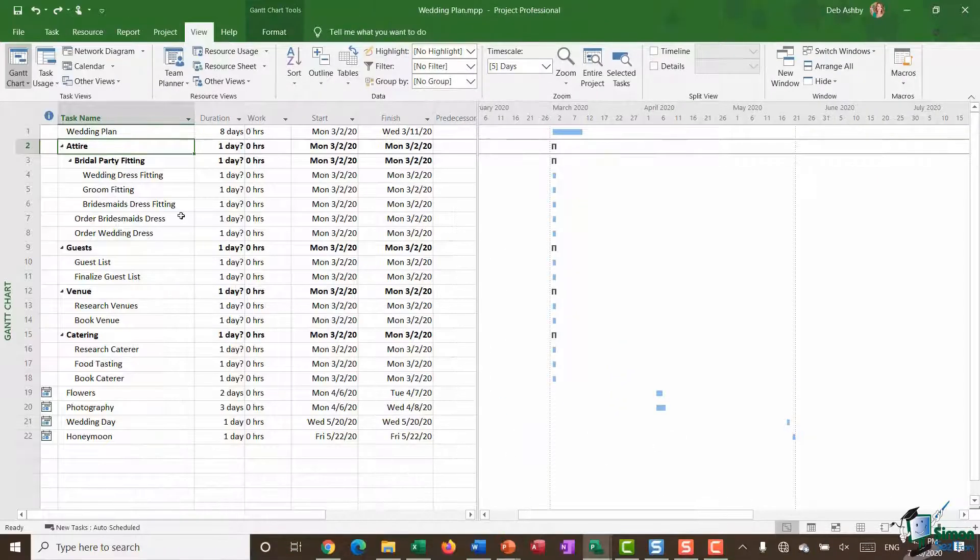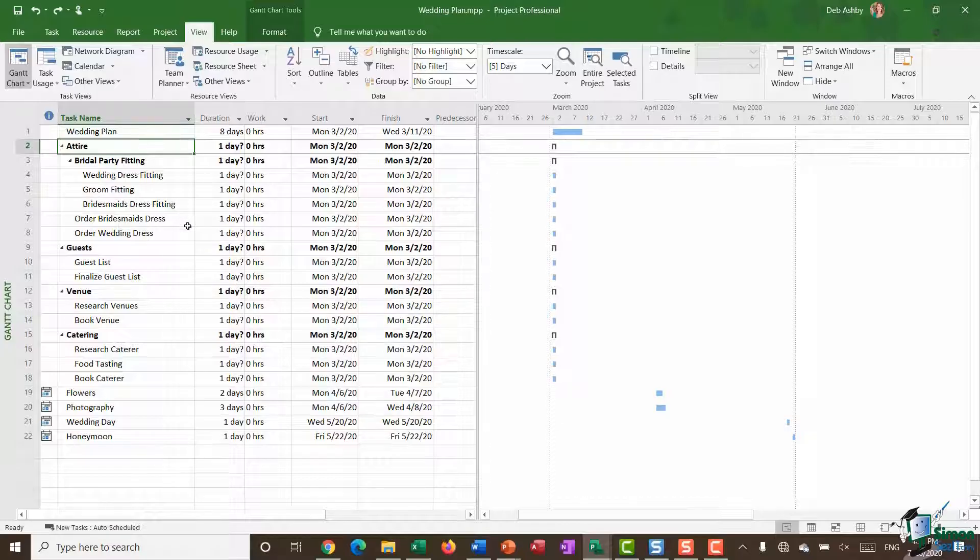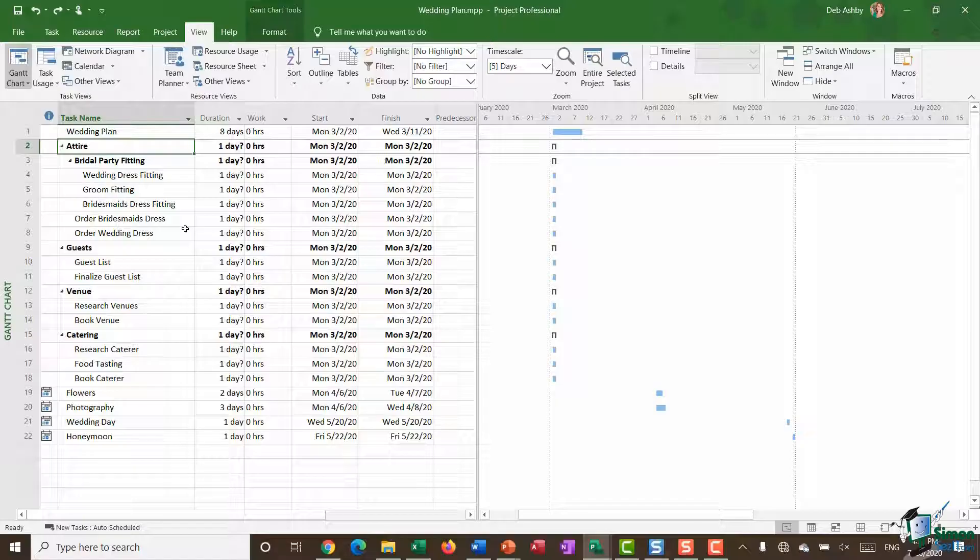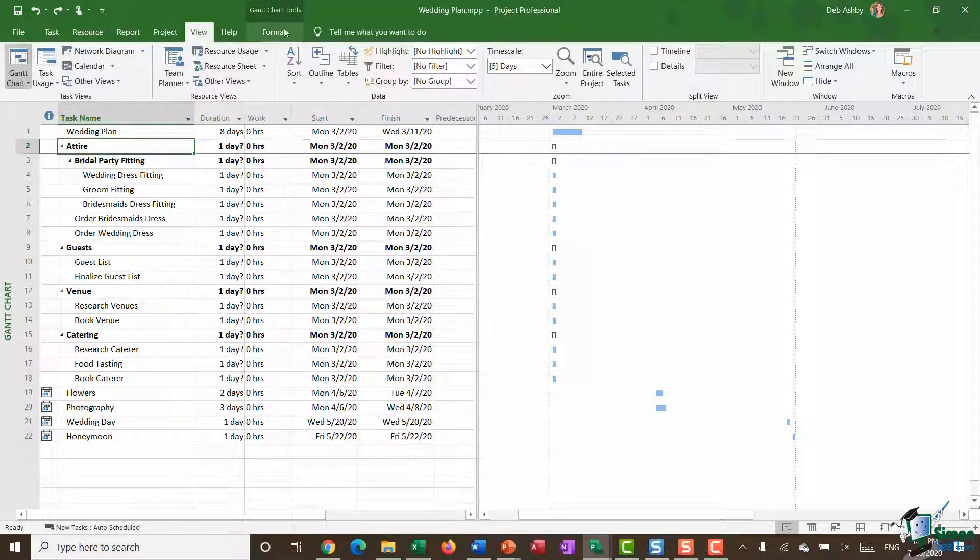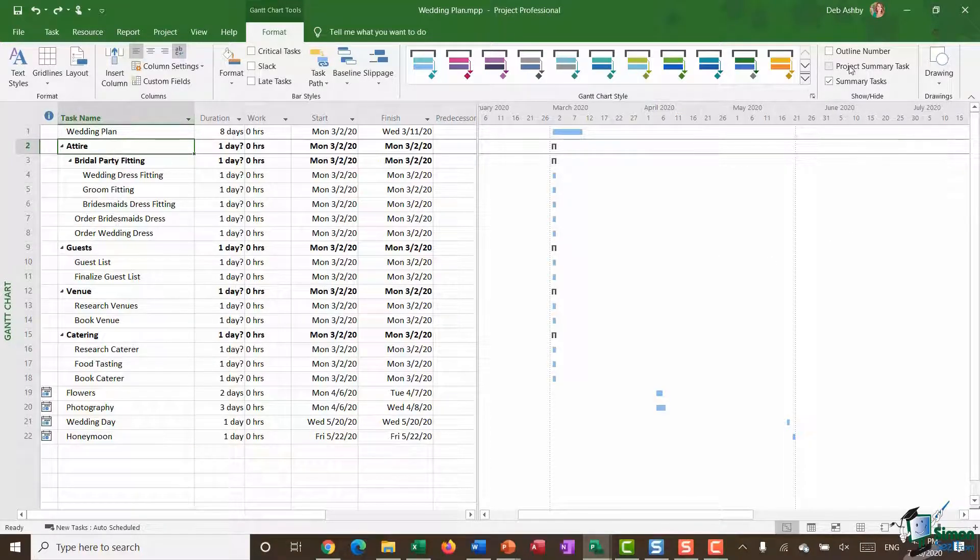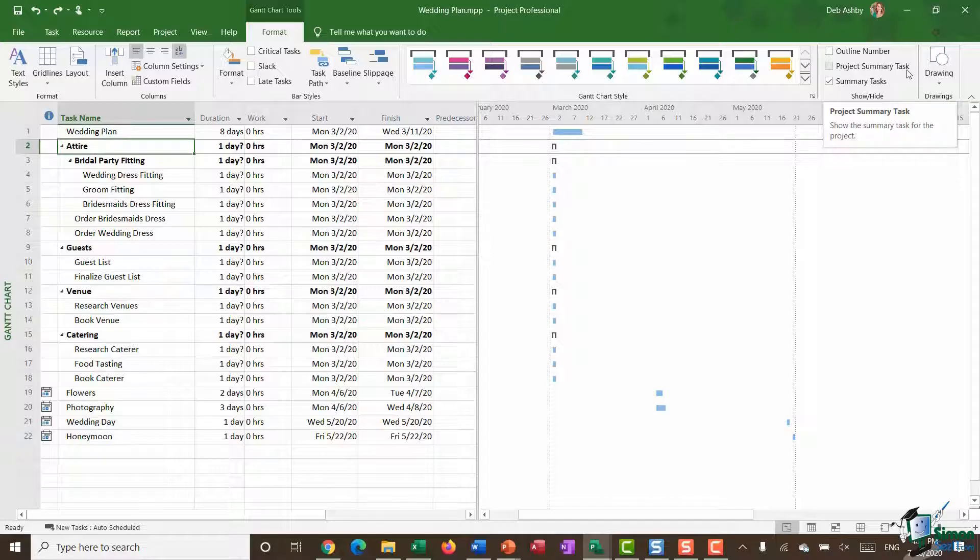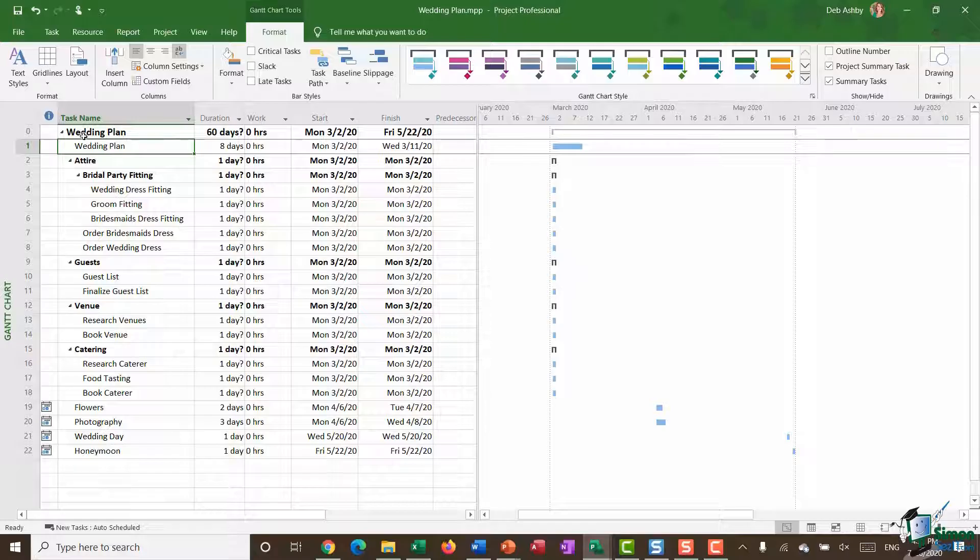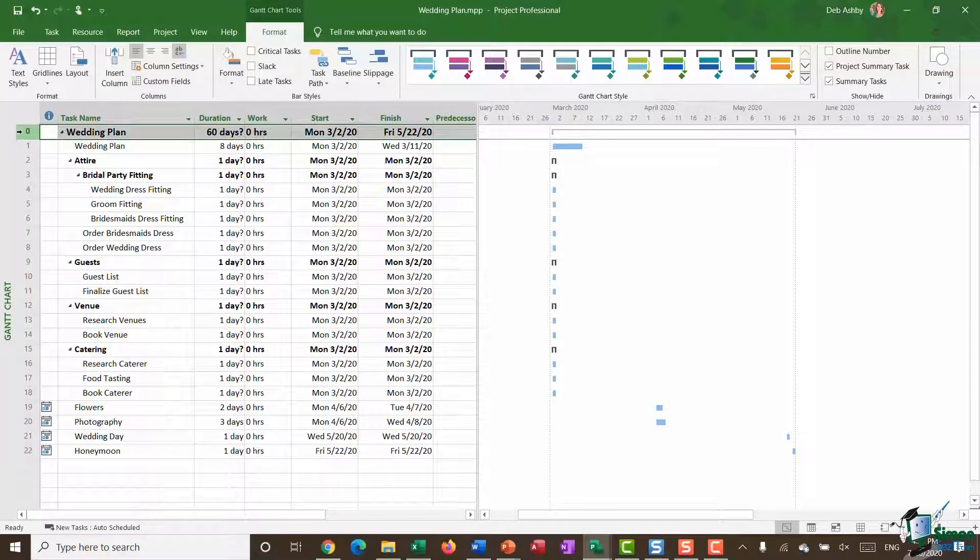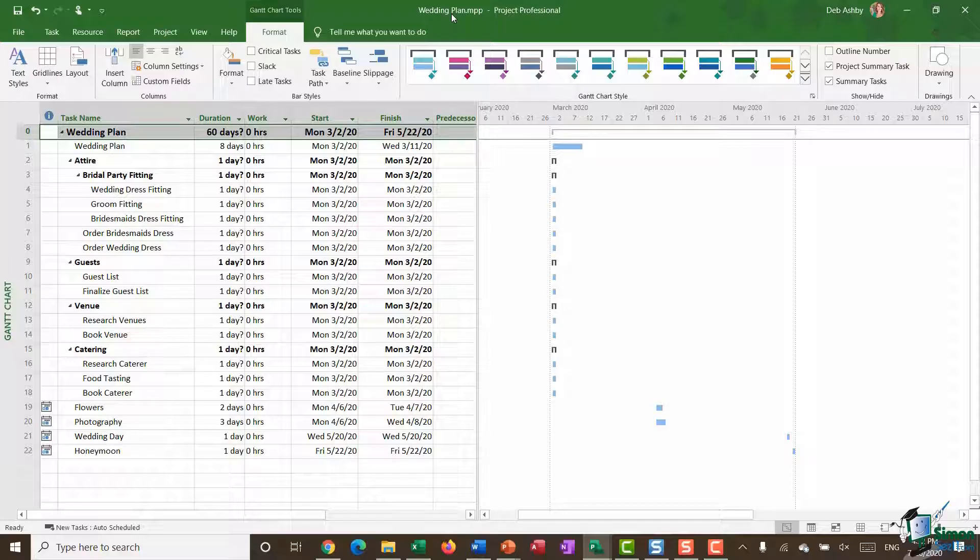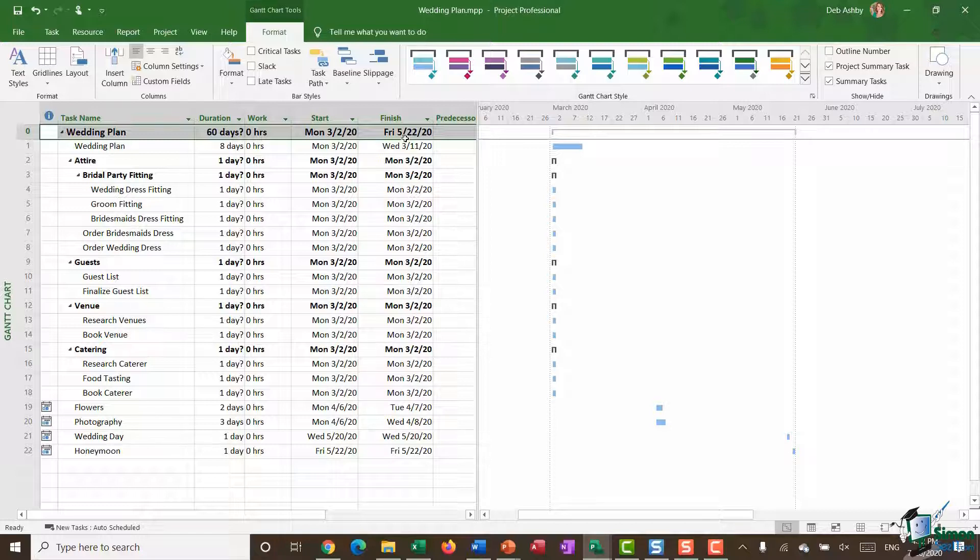Now one thing you can do is you can add a project summary task to your project. So essentially the project becomes a task of its own and this helps you see an overview of your entire project. If you would like to turn that on, jump up to the format ribbon and all the way over in the show hide group you'll see you have an option there for project summary task. Let's put a check in that box and what you'll see is that now at the top we have a new task labeled as task zero. It says wedding plan and it's getting this name from the name of this particular file, and then we have the overall duration, the project start date, and the project finish date. So sometimes that's quite nice to be able to see that information at the top of your task list.